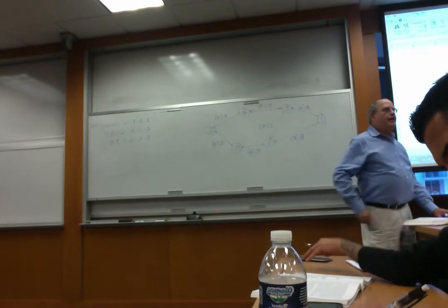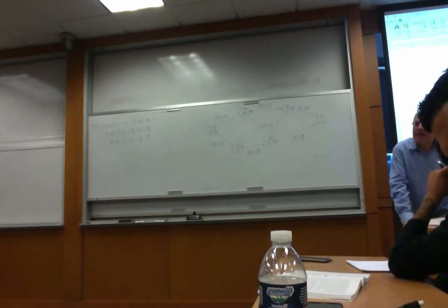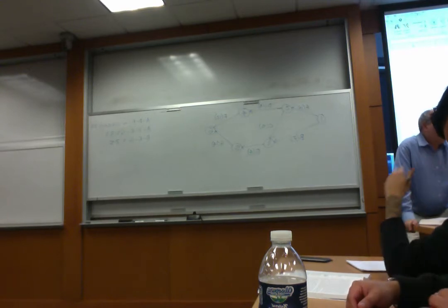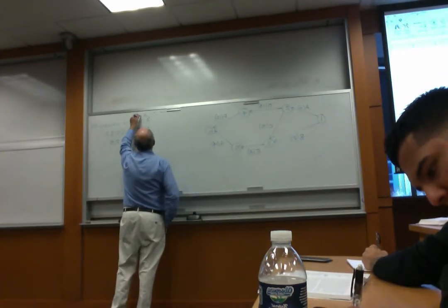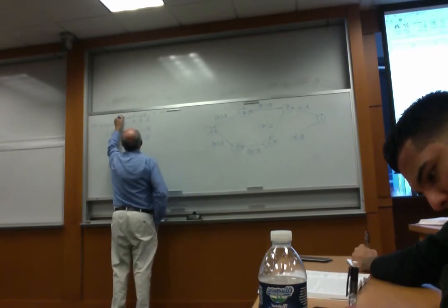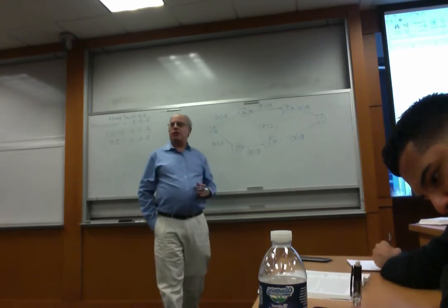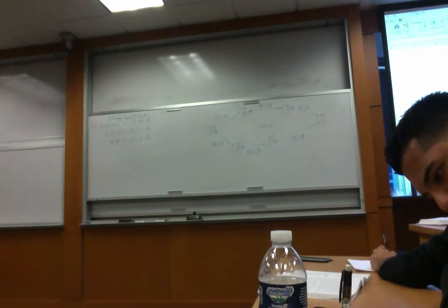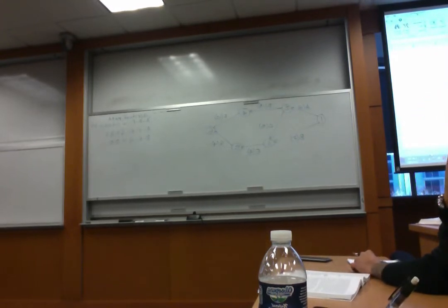The longest one. And I told you, in project management terminology, there is a specific term for the longest path. The longest path is called critical path. So I said, let me write it so you know. The longest path, so in this case is this one, is called the critical path. This is a standard term in project management. So if somebody asks you, what is the critical path in a project? Answer: the critical path is the longest path.